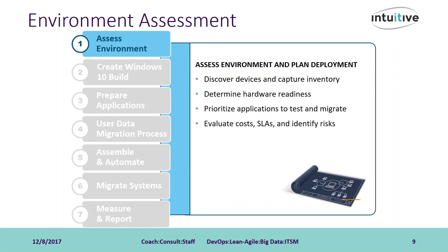Meet with the various lines of business that have specialty hardware or software in order to reassess their needs going forward. Determine the hardware readiness of your environment to create the possible scenarios for upgrade. For example, the number of computers that can be migrated to Windows 10 with an in-place migration versus a reload, or the number that will need additional hardware for the upgrade, the number that will need to